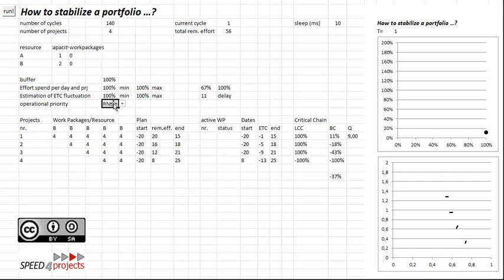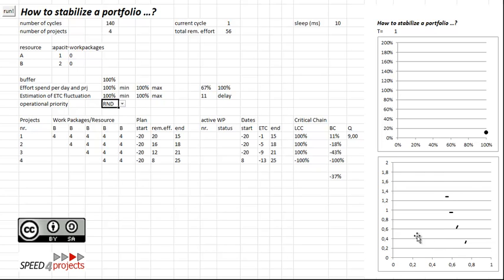What's very common in such a portfolio is the operational scheduling priority algorithm called Random. The one who gets the most attention gets resources, and it's not planned at all. Let's have a look what will happen. The projects will finish somehow, but not on time at all.